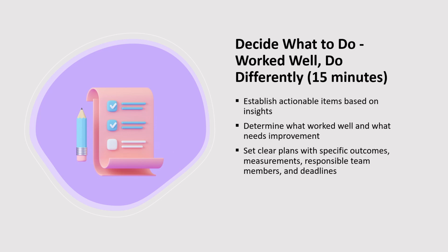Remember, your perfect retrospective should have at least one action item. The key is to ensure buy-in from your team and that the actions are something you can genuinely act upon. After all, you've dedicated time to uncover the root issue, so make sure you focus on one thing that can be accomplished in the upcoming week. This way, you make the most of everyone's time and efforts.